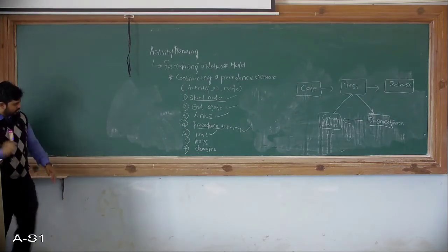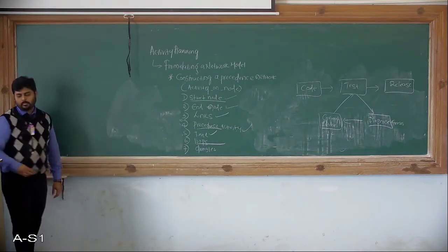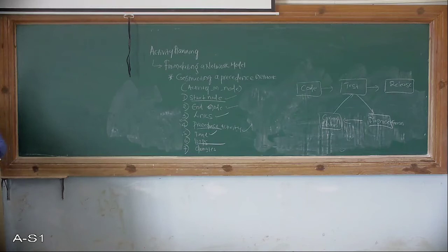We are discussing loops and dangles. What do you mean by loops over here? A loop, in one sense, is an error in that it represents a situation that cannot occur in practice. Yes, of course, we will discuss. While loops, in the sense of iteration, may occur in practice and cannot be directly represented in a project network. In some sequences it is an impossible sequence also.